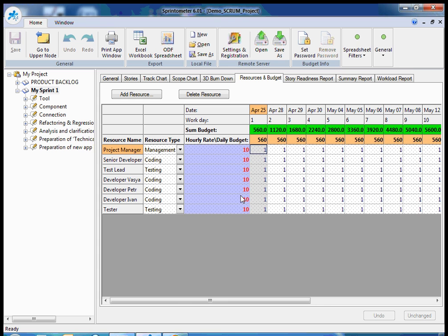Because if there are some rates and some schedule of resources provided for my sprint, I have here automatically calculated an accumulative budget and budget for each day. But this tab is necessary only if you have variable team resources during the sprint or if you'd like to manage budget inside Sprintometer.